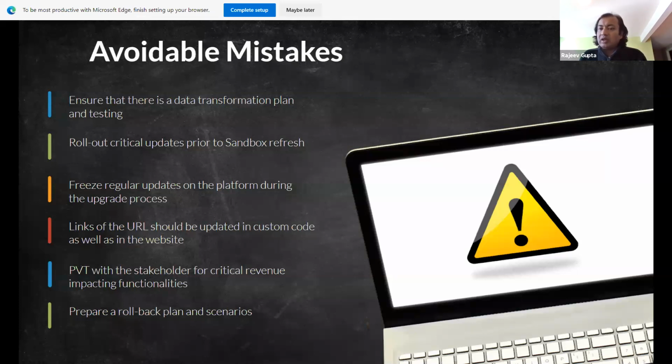So you go live and then you keep fixing the issues. It's more expensive to roll back than to keep fixing the issues. But theoretically, it's possible to roll back if you prepared well, you have experienced staff to make sure they know how to restore to previous setting before go live and what steps to take.